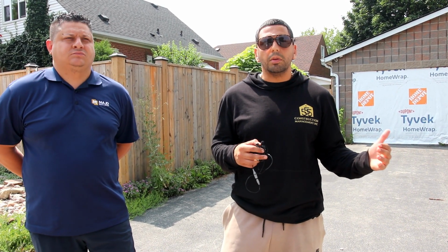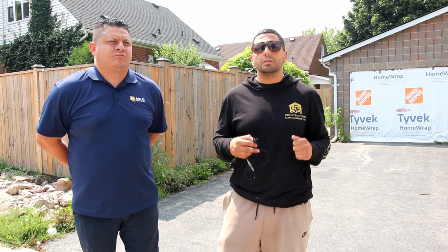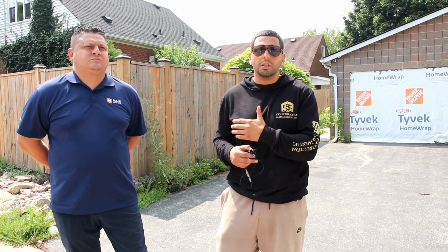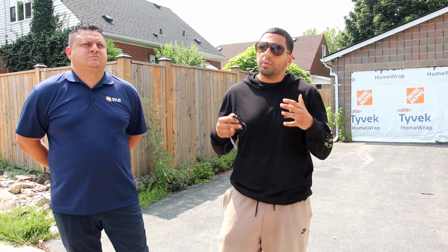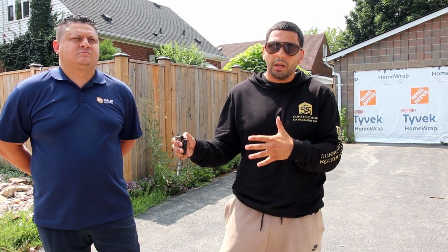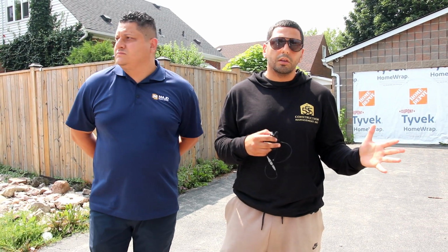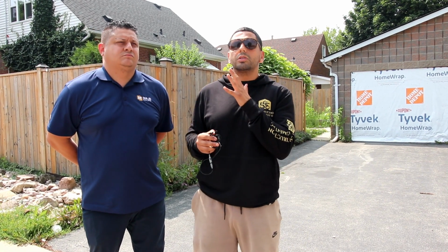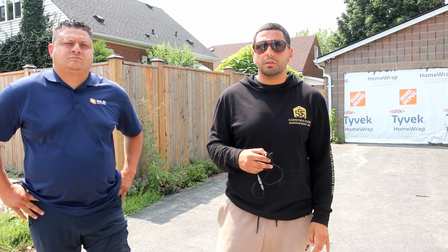And time is money in this game, because you have to understand, when we have a product like this, there's vacancy, and if there's vacancy, that means we're carrying, and that's carrying costs and soft costs that the owner is taking on. So what we would suggest or advise is make sure you have a conservative budget there for timelines if you are running a project like this, to consider those impacts from the city, because that will be out of the control, out of your hands and out of the hands of the construction team. Okay, so that would be one little item I would definitely want you to take away from all projects. Don't stress over the hard costs. I mean, that's obviously a factor, but it's also the soft costs and the carrying that you want to take into consideration. Okay guys, so you've heard it on the construction side.